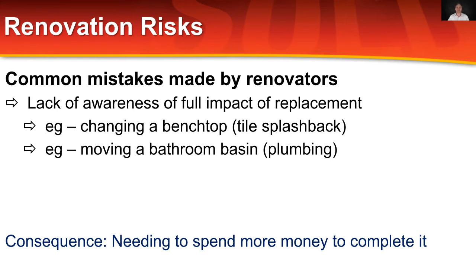Again, a lack of awareness of the full impact of replacement kind of goes hand in hand with demolishing too much. If you change your benchtop, so let's say, for example, I'm looking to buy a bath, so I buy my $100 bath and I try and fit that in because it's cheap, I want to make that work. But if you're not considering where the waste hole is in the bath, the faucet in the bath you buy might have it in a different location than the bath that exists. Where the taps go might be different than where they are on the existing bath. The size of the hob, the frame within which the bath sits, might be different if you get the wrong size bath. You might buy something a little small, you might buy something a little big. And all of that requires change.